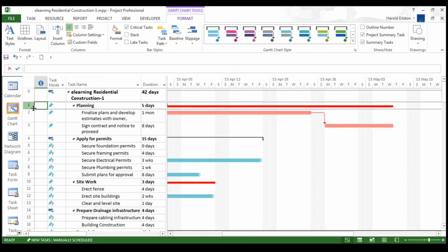The total work to be performed has a constant value, and the total amount of work performed on a task is the total of all the resources used on the task. An example here is when we've got a wall to paint within a room. The room's got 4 walls. The painter can paint 1 wall per day, so it will take him 4 days to paint all 4 walls. If we want to shorten that duration, we add additional resources. Say we add an additional 3 resources. That will bring our work down to 1 day, because 4 resources will be able to do it in a shorter duration.